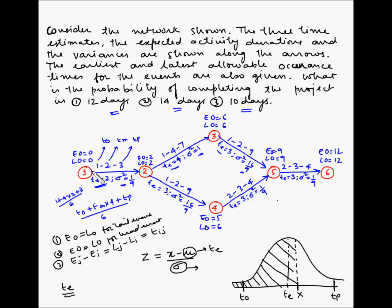For activity 2-3: condition 1 — EO = LO for the tail event: met. Condition 2 — EO = LO for the head event: both are 6, so met. Condition 3 — EO of head minus EO of tail = 6 minus 2 = 4, and LJ minus LI is also 4, and Te = 4. All three are 4, so activity 2-3 is also a critical activity.